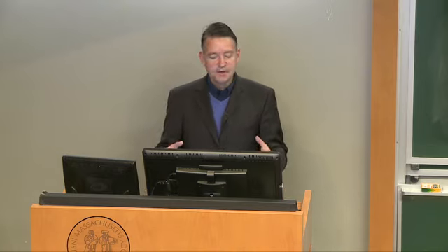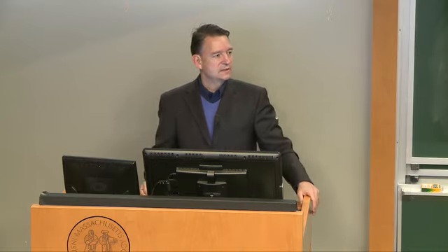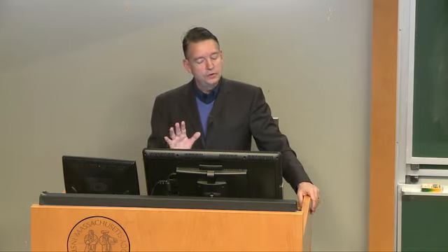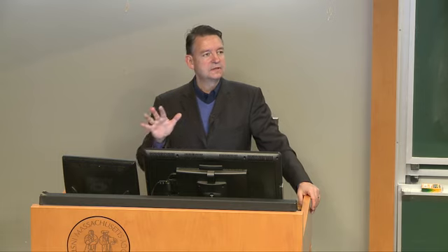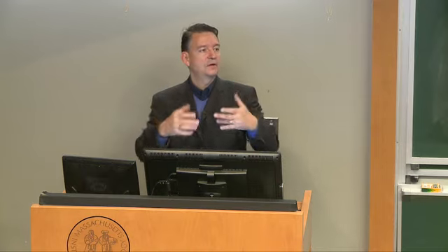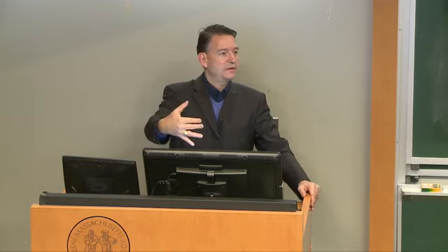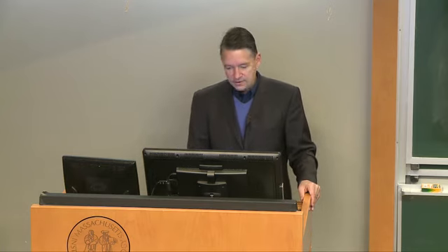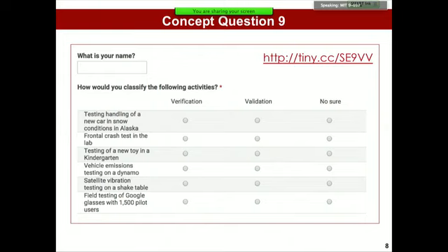Typically, validation implies you've got to use the whole system to do it. Or you basically use dummy subsystems. You replace the actual subsystems you're going to have with something temporary so that you can go back to the stakeholder and give them as close to the real experience as they'll have with the actual system. Okay, so that's essentially the distinction here.